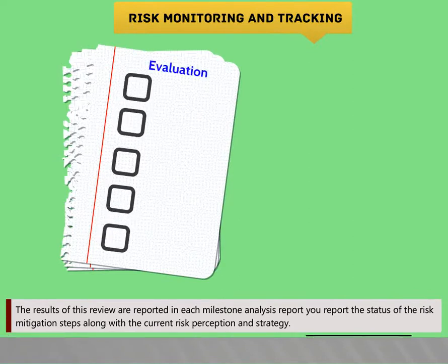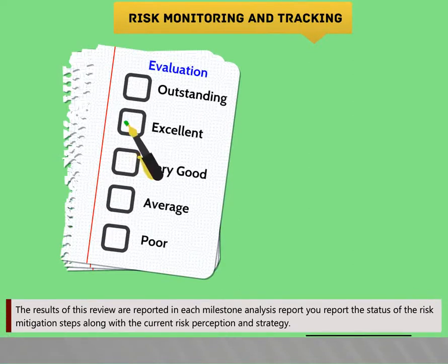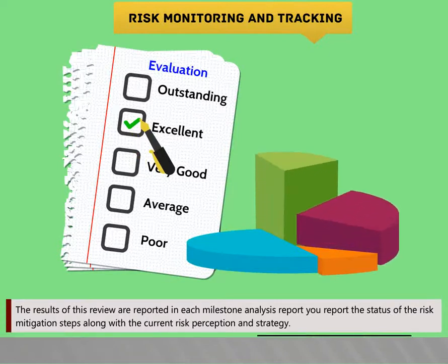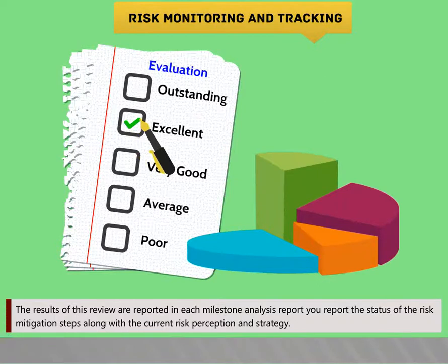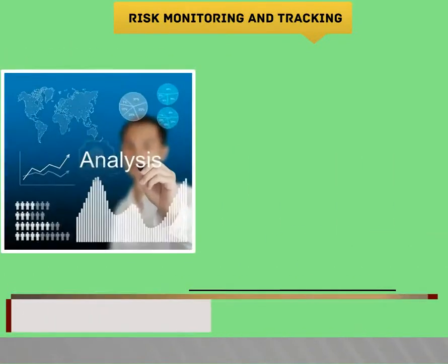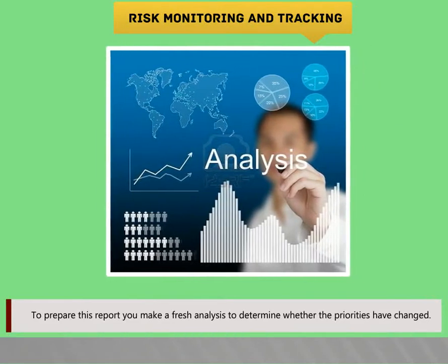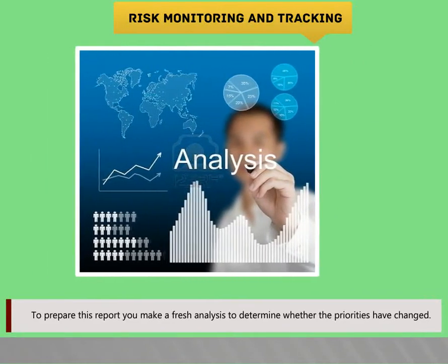The results of this review are reported in each milestone analysis report. You report the status of the risk mitigation steps along with the current risk perception and strategy. To prepare this report, you make a fresh analysis to determine whether the priorities have changed.